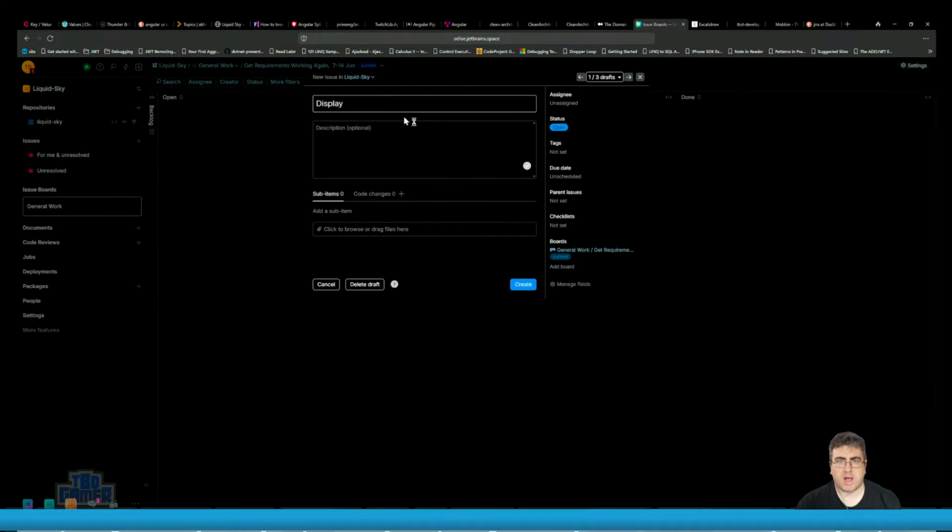I would rather say, okay, I'll look at that and we'll point it as this, or I need a bit of time to spike and figure out what that code does to give you any more accurate estimate, right? Which in some organizations is fine. Time is always going to be focused on, though. I get why time matters. What I don't like is being asked in a planning meeting and having developers provide those deadlines without talking to the rest of the team, right? What I don't like is being held to those timelines. Because, again, if you make developers feel that they've got to rush, they'll rush, and the code will reflect it.